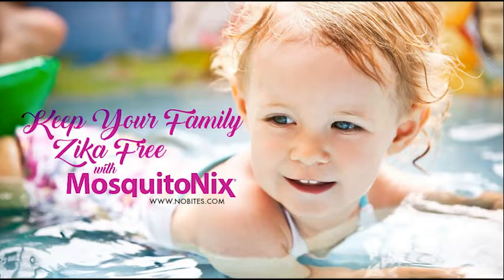So I think it's important. One of the things I was going to add is when you're involved in those very early meetings in the design process, you're as much there to learn about what they want and help advise Steve in the design process, and also to point the clients in the right direction for some of their long lead items, for example, things that are going to be more difficult or need more time. So you're working both sides of that equation. Yes. And I do think that's why we've involved me early on in the meetings, so that Steve can design the house even quicker. A lot of that stuff is answered up front, and the whole process just moves quicker.